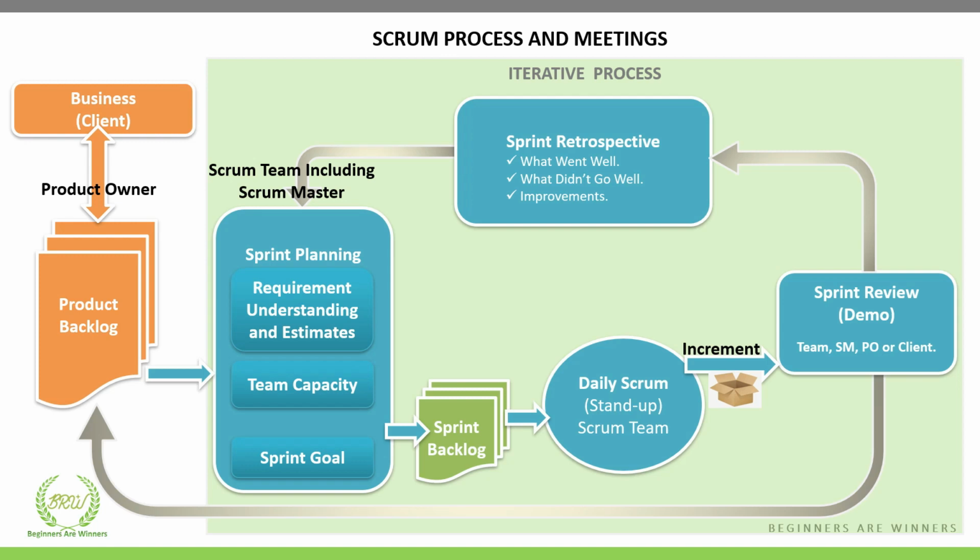A single task shouldn't be more than 12 hours of effort, or it must be split into smaller tasks if it exceeds 8 or 12 hours. And R&D items can also be added as a task. For example, if the team feels that they don't have a clear solution, or they are unclear about the solution approach, the team may want to explore and experiment, and that's how they also do the story pointing or ballpark estimates for the R&D work items as well.